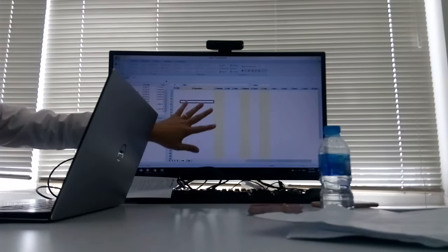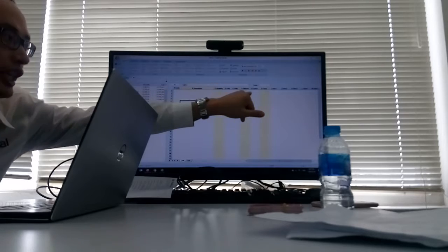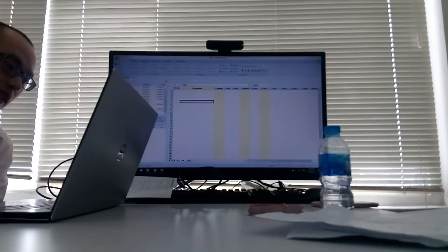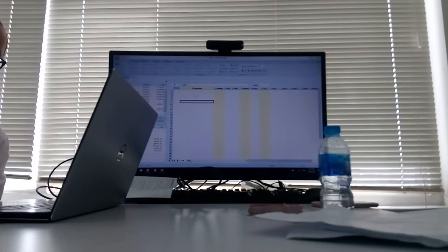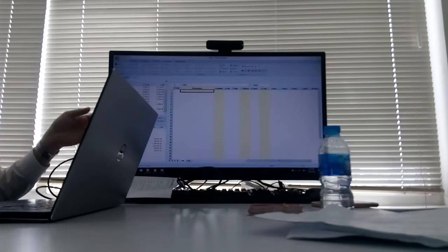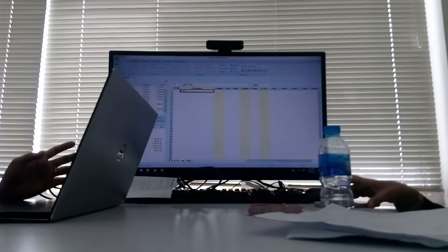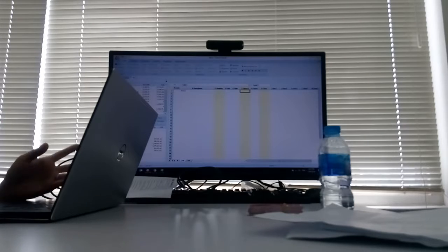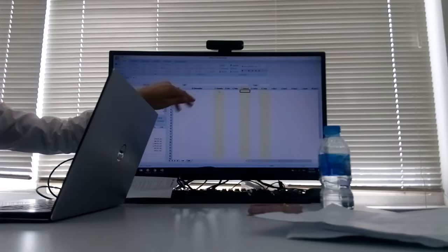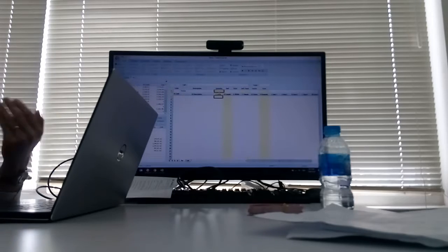So this is a sample. When you start out a workbook, the standard template is code A to H, which is fixed for the standard BQ format. So for you to input the data into your BQ description, you can look for the facilities or you can just type it inside. Then the breakdown inside here is the spreadsheet quantity, rate, and subtotal. These are the 3 columns you can double click to do the breakdown.